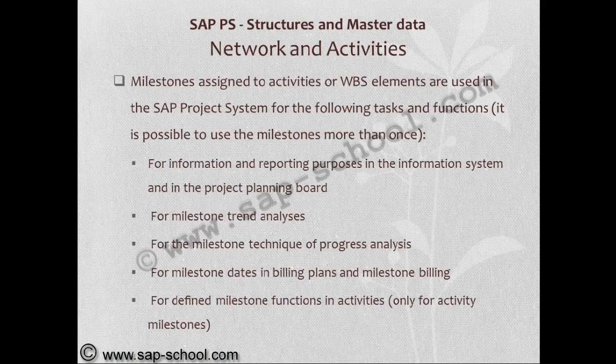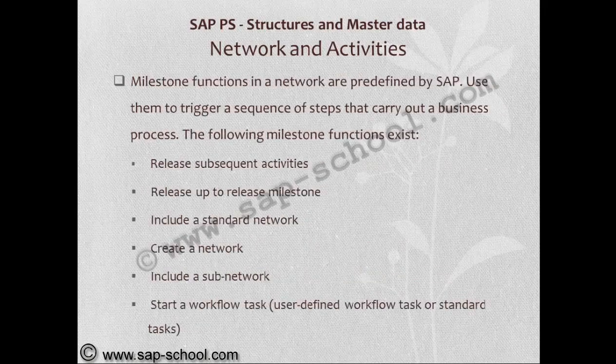For defined milestone functions in activities: release subsequent activities, release up to milestone, include a standard network, create a network, include a subnetwork, start a workflow task. So these are the functions we use with the milestones.